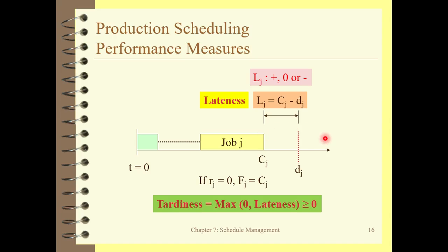Don't forget that lateness has the opposite sign to the slack. Lateness is plus, slack will be minus. If lateness is minus or negative, we get positive slack, something like that. Don't forget that. Sometimes I will ask you in your final exam.